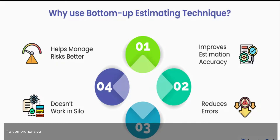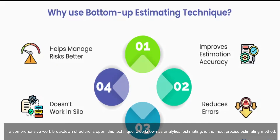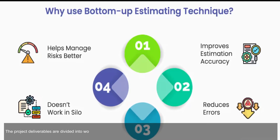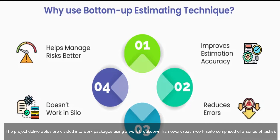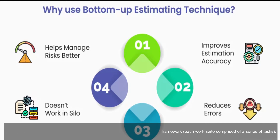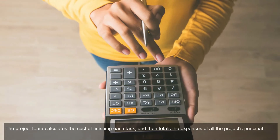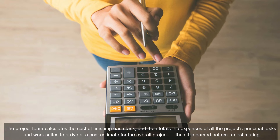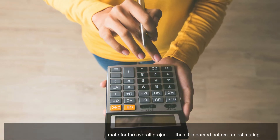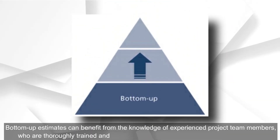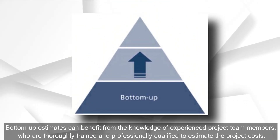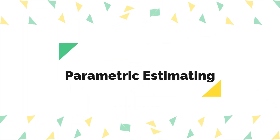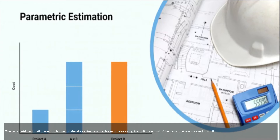Bottom-up estimating: if a comprehensive work breakdown structure is available, this technique, also known as analytical estimating, is the most precise estimating method. The project deliverables are divided into work packages using a work breakdown framework. The project team calculates the cost of finishing each task, then totals the expenses of all principal tasks and work suites to arrive at an overall cost estimate. Bottom-up estimates can benefit from the knowledge of experienced, professionally qualified project team members.